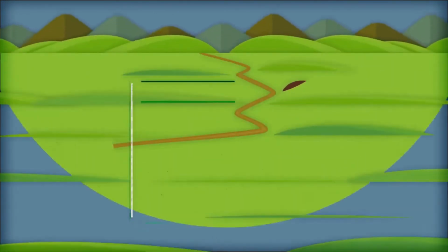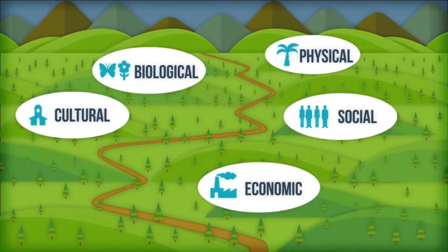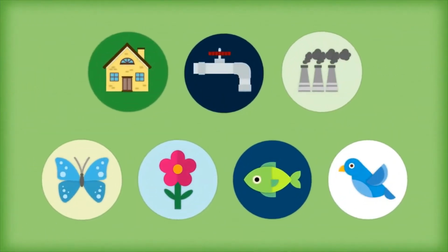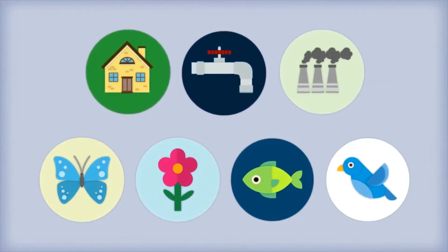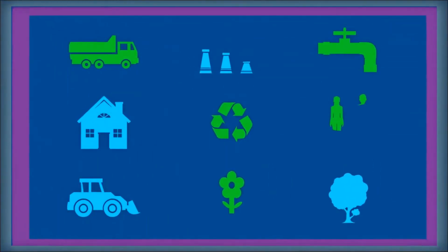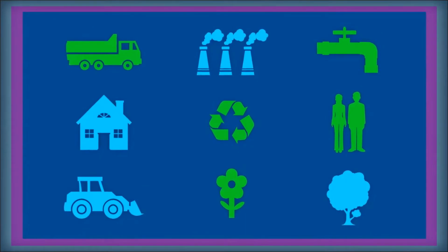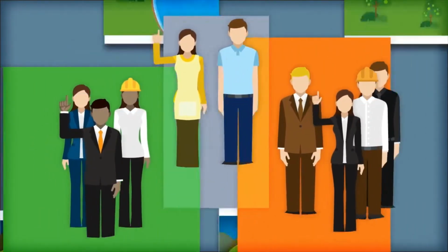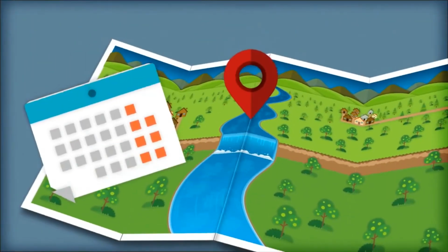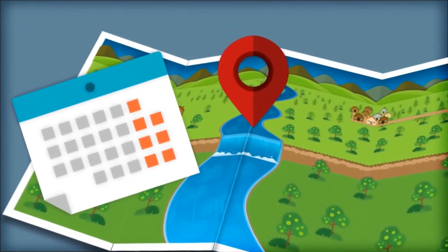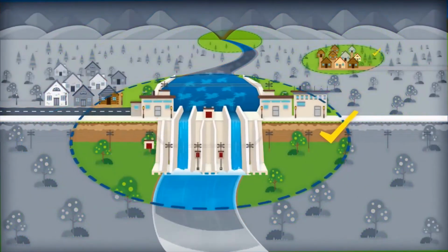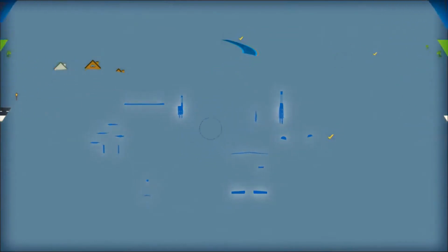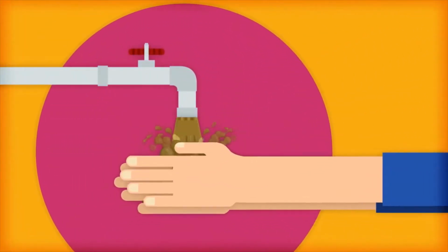Some helpful criteria for evaluating the adequacy of the scoping include the following. Are potentially significant issues and interactions for natural and human environments indicated? Are insignificant issues identified and their exclusion from further assessment justified? Are the viewpoints of all stakeholders considered? Are the spatial and temporal scopes of the EIA defined in sufficient detail? Is an adequate geographic area considered? Are any significant issues omitted? Are key issues and situations clarified?